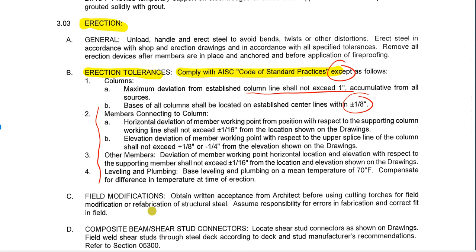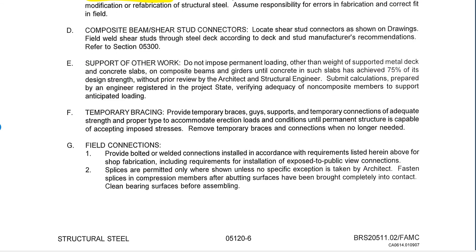Down here it talks about what happens if you need to do field modifications — that would go through the RFI process. There's also discussion of when you can actually start putting beams and girders in concrete, looking at the design strength of the concrete or whether it's been reviewed by the architect or structural engineer of record. Temporary bracing is the responsibility of the steel erector, and must be removed when no longer needed. Finally, there are specifics on how to do field connections, particularly where things are exposed to public view.